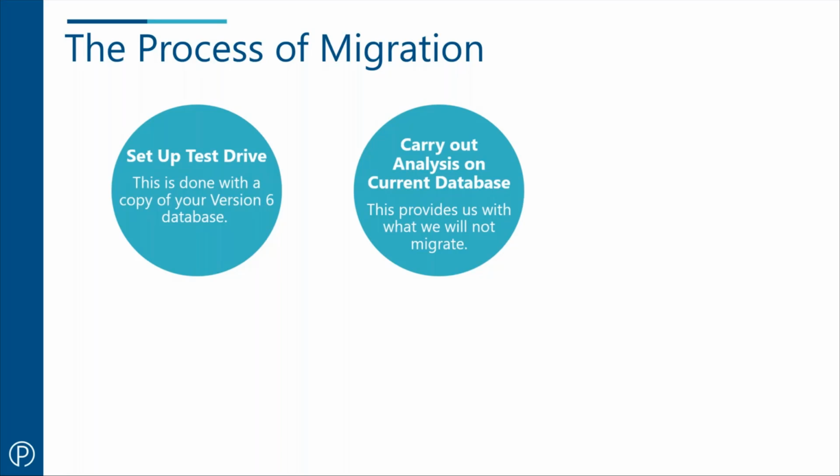We actually then review that ourselves in-house, tidy it up a little bit, and then we send them through to the customers to go through and review each of the items on there, and give you a chance to actually say whether you use the things anymore. So on the document section of that analysis, we say when the last time that document was actually used by somebody. If it was used 6 months to 12 months ago, it's probably likely we don't want to spend the time and effort or any of your budget on migrating those things that you're not actually using anymore.